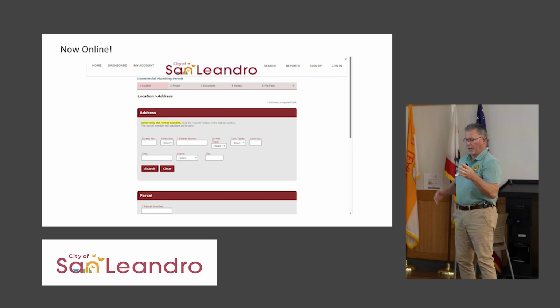It used to take anywhere from 10 to 12 days just to get it out, because it would come into a physical queue. So we've already saved, that's business days, basically 2 weeks of just sitting there. To be fair, there's a queue. We're not going to pluck out of the back of the queue, we can't, because it creates all kinds of issues.